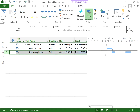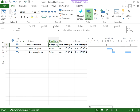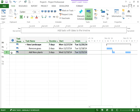And that's it. Now you can see that our duration has changed to seven days, and task number three, adding the new plants, has moved from Wednesday the 19th with a finish date of the 25th. Thank you very much.